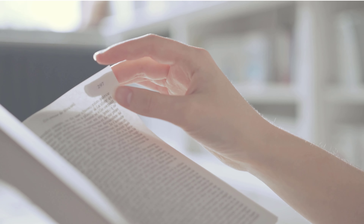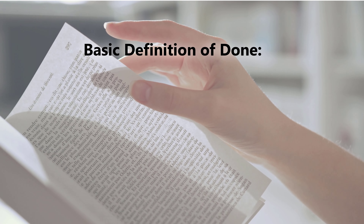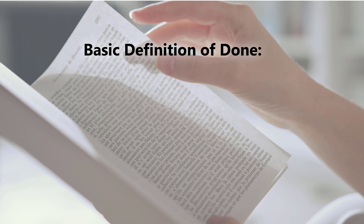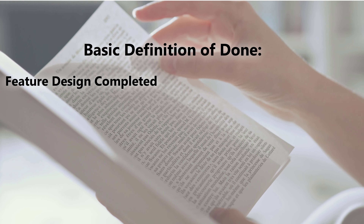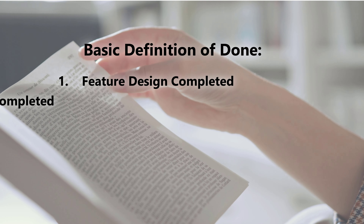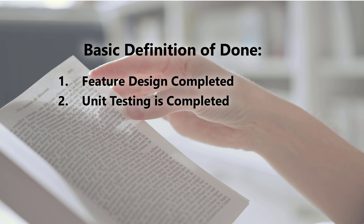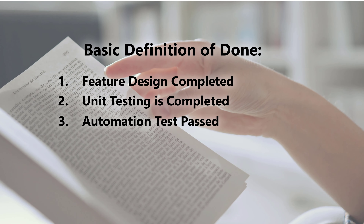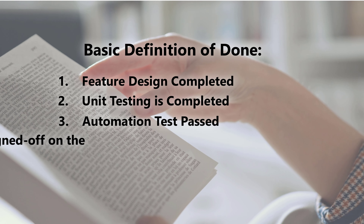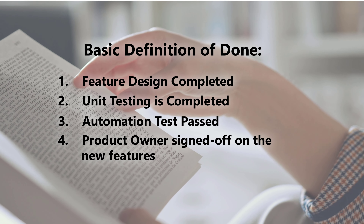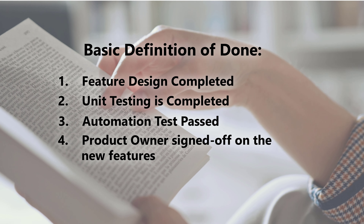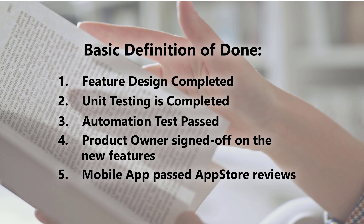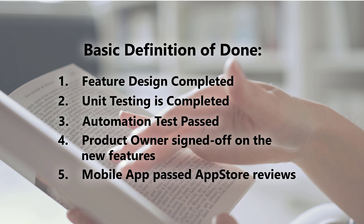Here is a sample, very basic definition of done, which consists of five checklist items. Number one: feature design completed. Number two: unit testing is completed. Number three: automation test passed. Number four: product owner signed off on new features. And number five: mobile app passed App Store reviews.